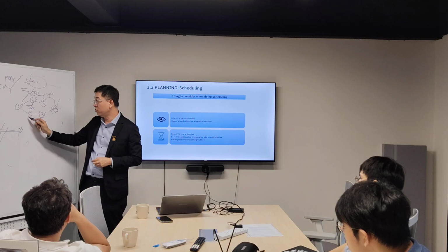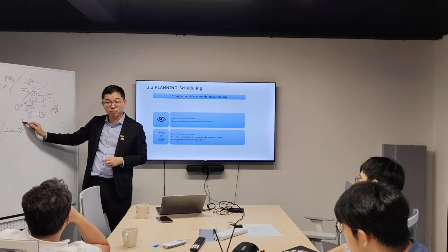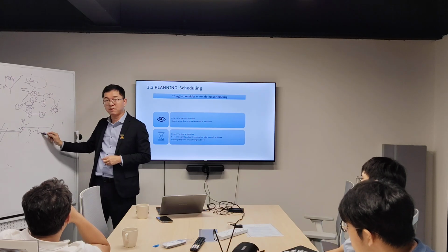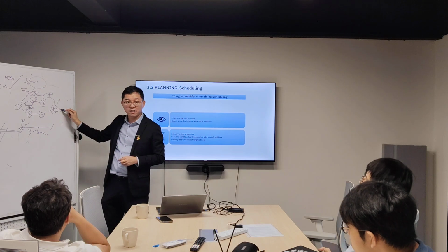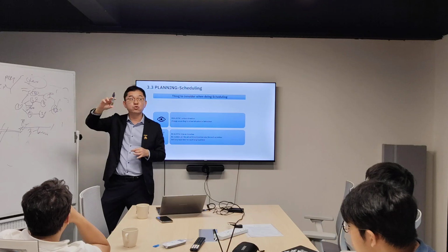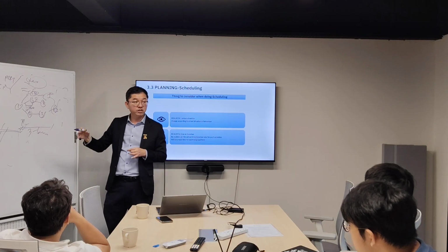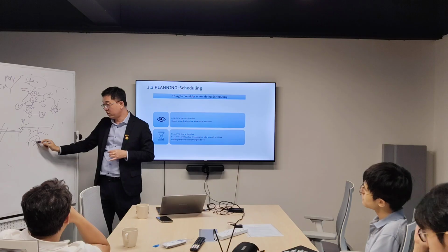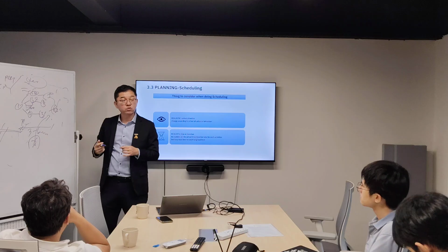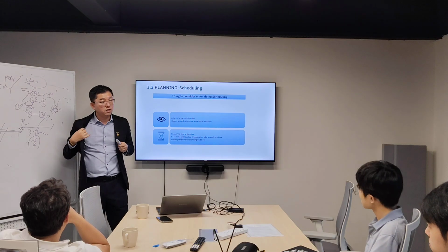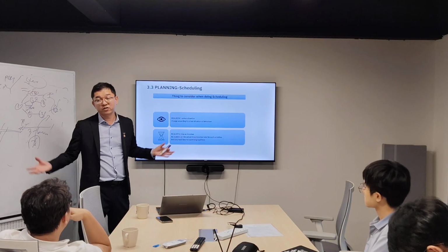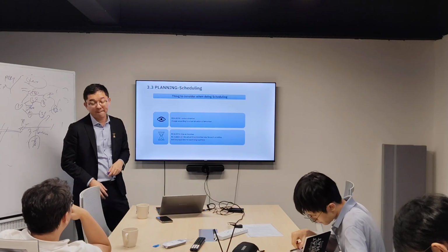Maybe you should start during this activity already. You need to procure your transformer, because the lead time may be 3 months to 6 months. So when up to 6 months, your whole building, everything is completed, but you need to do the architectural work like painting, everything. This transformer can go in to be installed in the transformer room and then do testing and commissioning. You can do it concurrently. That's why you need to consider the lead time for every equipment. So these are things that you need to come up with in the planning. Okay?